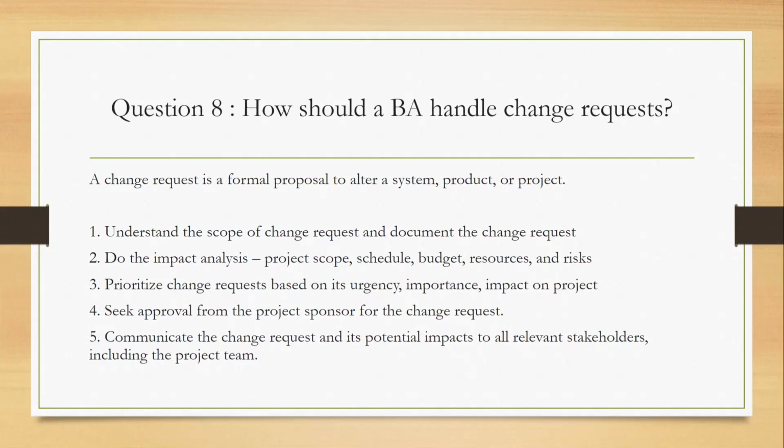Okay, so you will send the request to that board, and they will accept it. If they accept it, then only will you start this change request. Okay, and you need to communicate the change request, whatever the potential things are, with the stakeholders, and it should be included in the project. That's it. This is how you handle a change request.